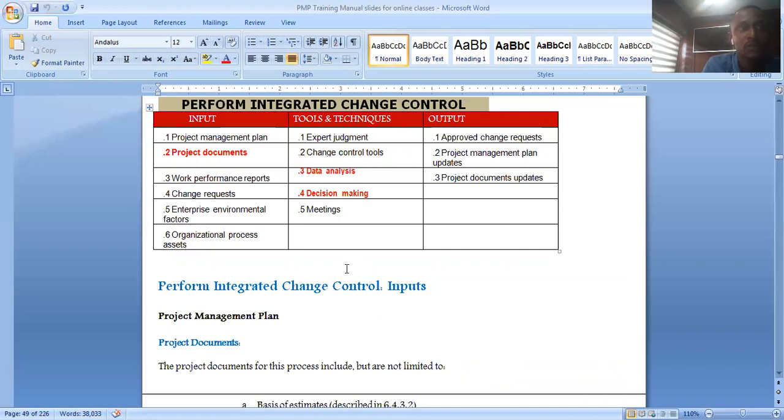And I told us something the other day. I said, when a change is requested and rejected, still write it down. He said we should put 3 windows, and we looked at it and said, no, it's not economically viable. We rejected it, write it down in a rejected change request register, because some of them are tricky. They will still kick it in. And okay, I tell you, before now, I use the money to buy it. I told you before now. When you tell me waiting, I talk.